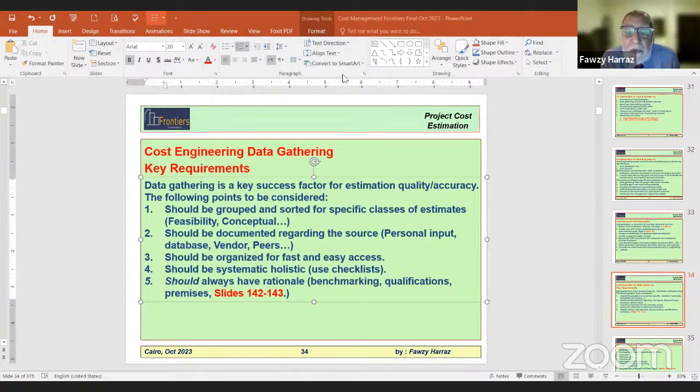In government projects, how to avoid this? I think the acceptable thing is to recommend rebidding. The thing is, if you reject the lowest bid in a government project, they will make a big attack, a big backfire on you. I'm the winner and you exclude me. They will go to the highest level and make a big fire on the bid committee.